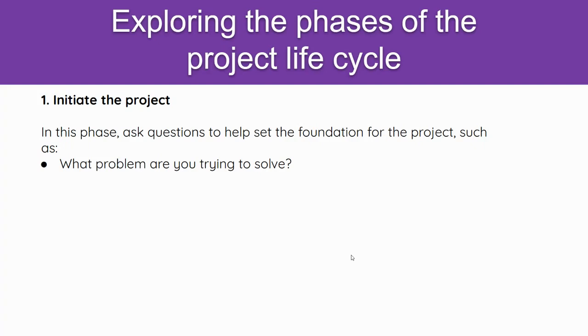So with this, at the beginning of the project, we ask ourselves, what is the specific problem we're trying to solve? This will help us understand what will be our solution to the problem. So we need to first understand the problem before we talk about the solution. In this concept, we use the problem tree analysis to understand the problem very well. This problem tree analysis entails trying to know all the problems surrounding a single problem we identify. We also need to identify the causes of the problem and the effect of the problem. The problem tree analysis will help us to go deeper and get the root causes of the problem, and these root causes can be an action point to solving the problem.